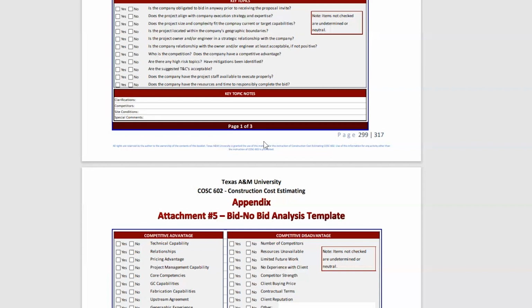And another thing that we dealt with regularly is that, as an estimating department, we were writing qualifications saying that's not in there, hoping that it would get pulled in either by reference or directly into the contract, so we could write a change order against that.